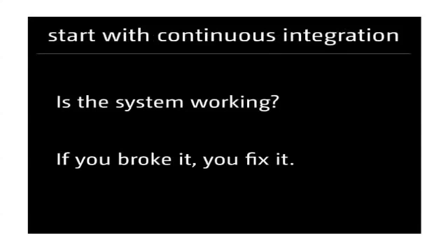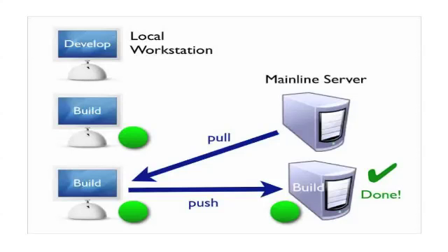It enforces a minimal level of done. You can't say you're done until your change has made it into mainline and past CI. And CI enforces that. And the deployment pipeline is about getting progressively more rigorous in your definition of done, effectively. So, you need to do continuous integration. You need to put it in place. You need to make sure the build is consistently green and that the team prioritizes keeping the build green. That's the most important thing, the first step that you can implement.